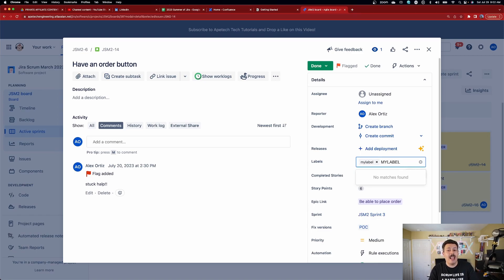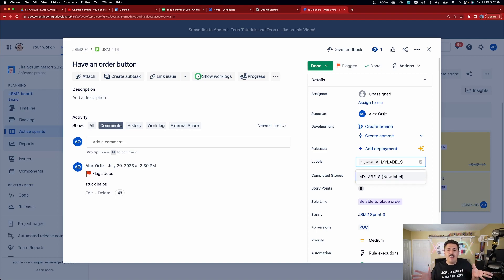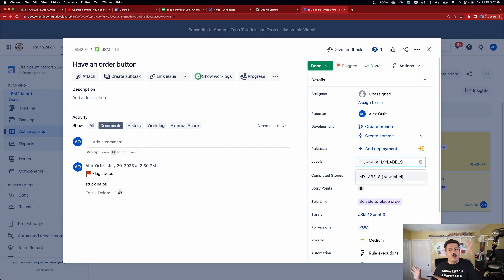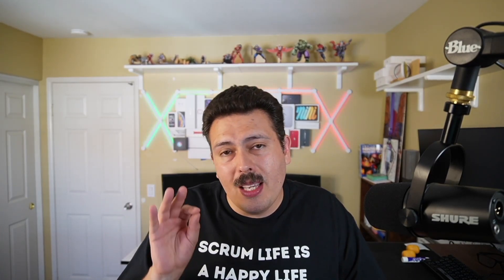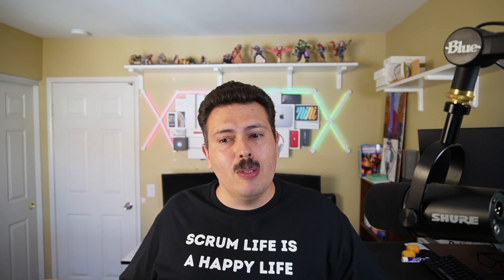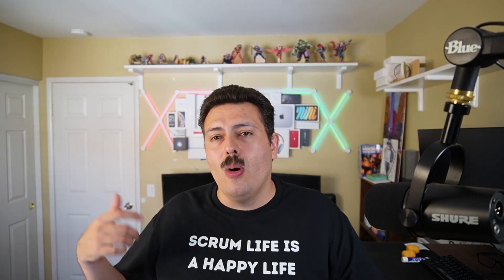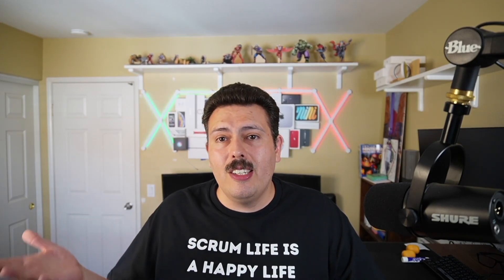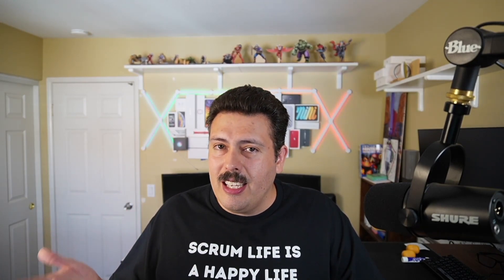when I add an S, now it's not the same characters. Now the characters have changed and JIRA is going to treat this as a completely new label, which by the way, this is one of the reasons why I don't like using labels because it's easy for your team to accidentally put a typo or add extra letters that they just didn't know or make it plural versus singular. And it's just going to mess up the data because now you're going to have various labels that are either misspelled or have extra letters to them. And it's just not going to yield the same results that you want. So always go the custom field route.